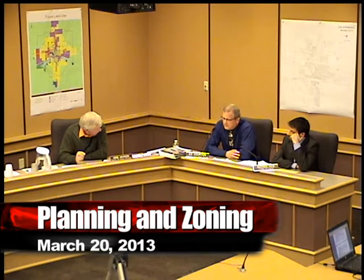60 days, I don't see that as a possibility. I really don't. Looking at our staff time, the projects we're starting with development season. Over the last week, we've seen a significant increase in calls and projects that are moving forward that we have to pay attention to in addition to everything else. 60 days is not an adequate turnaround to accomplish all those tasks and to have negotiations with the applicant. 90 days or longer is more realistic in my opinion. That being said, a lot of these conditions are placed on other departments, and I can't speak for them directly, but that would be my general feel.